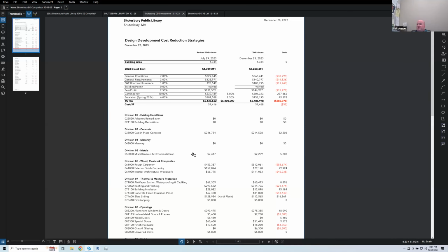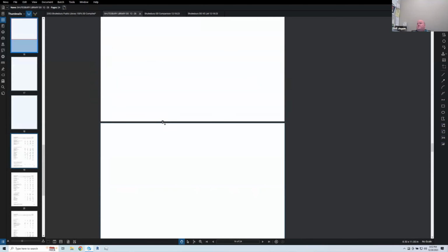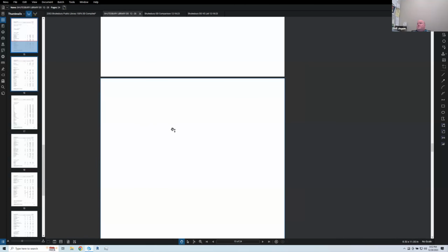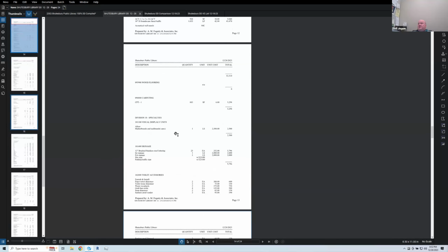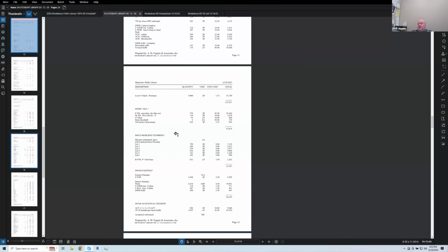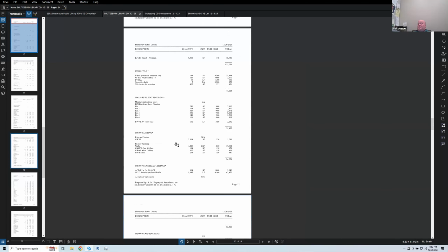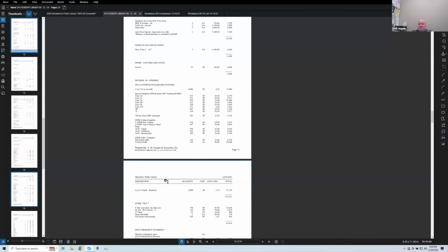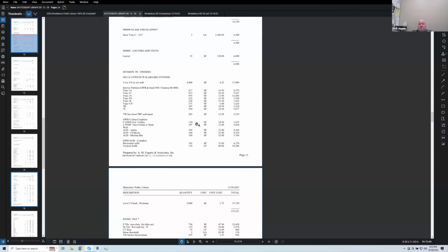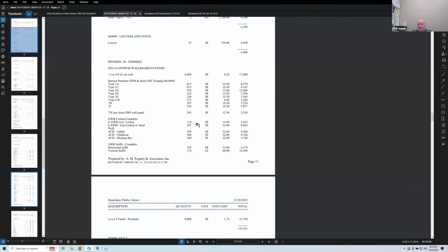I'm trying to find it now. So perforated gypsum ceiling with insulation, we're at $32 a square foot. For regular chipboard insulation ceiling, we're at $15. So it's roughly double the cost of a normal gypsum ceiling. But if you take it out, then you've got to add something for acoustic treatment, so it's not a dollar for dollar savings. You're saving another $5,000 or $10,000.